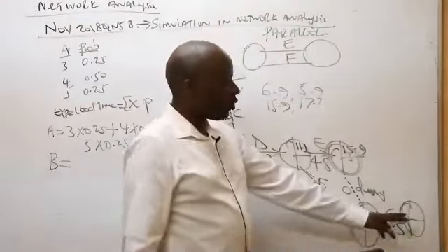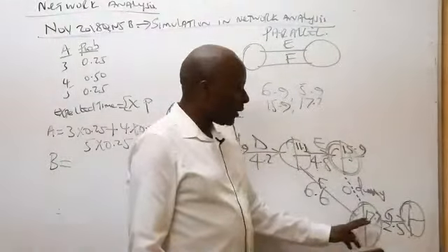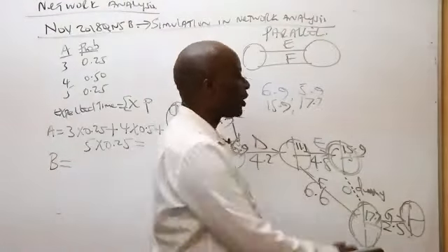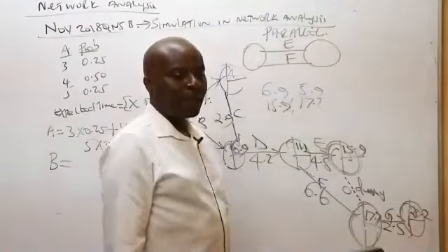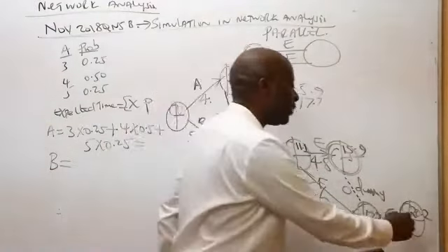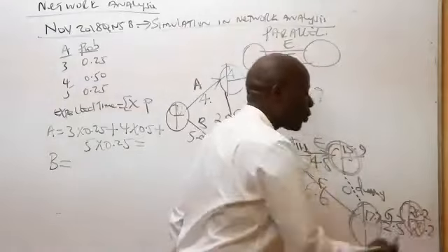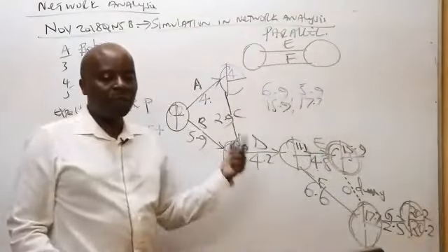And then, of course, there is no comparison here. So here I take 17.7 plus 2.5, which gave you, ladies and gentlemen, 20.2. I will put 20.2 here at the very end, and then now you subtract backwards.